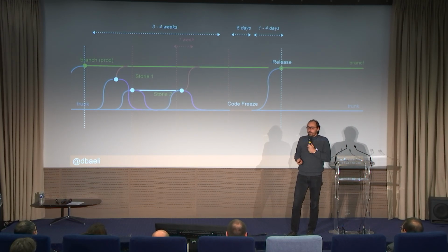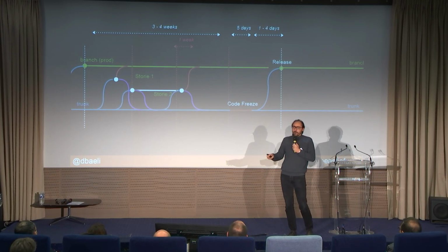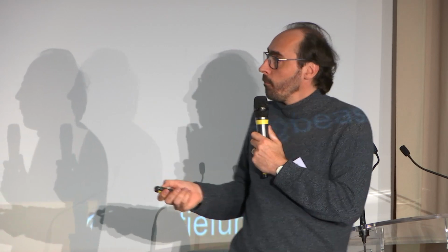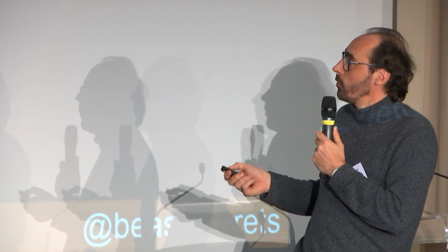So we went this way to release weekly, cherry picking, so taking the features that were interesting. We didn't change the organization much, but we just wanted to deliver a bit more often. So it's a bit cheating, a big cheating, if you want, but that does the work, and you have a lot of rework because you have to do it twice, but it has value. It's fair for me. You have value.